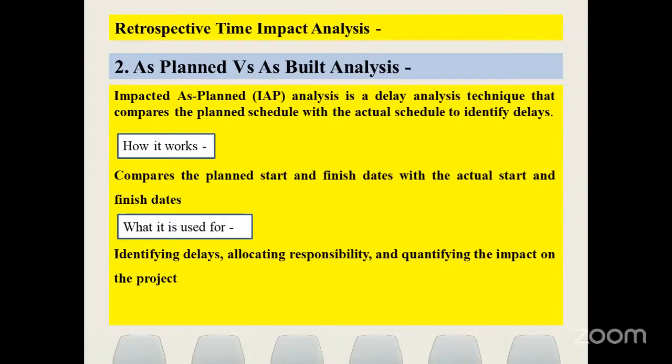This method is very simple and very similar to how we are updating or monitoring the schedule. We have to input the actual start, we have to input the actual finish, and mark the activities as per the actual progress that happened on site.